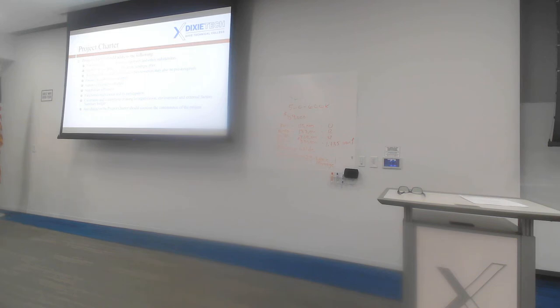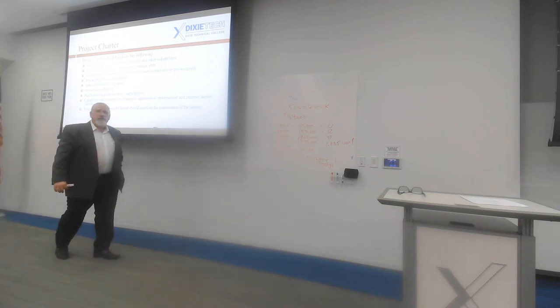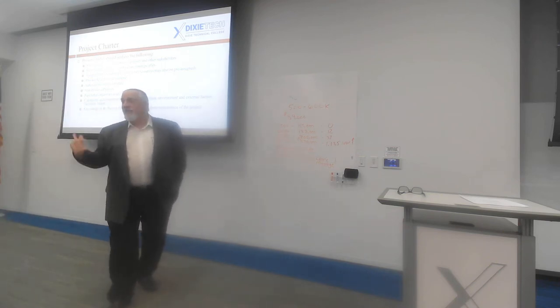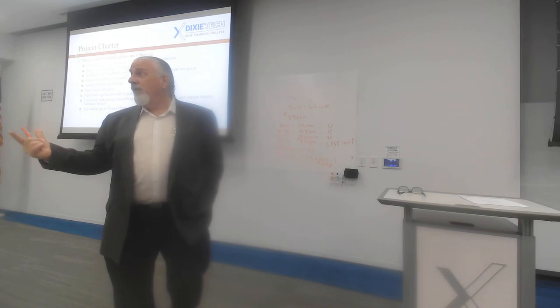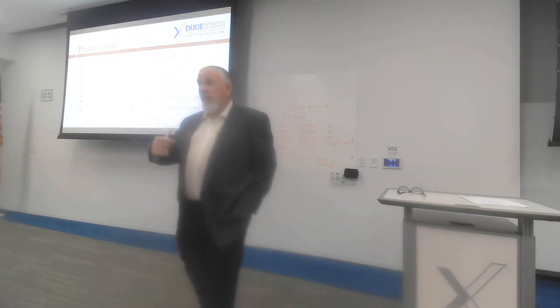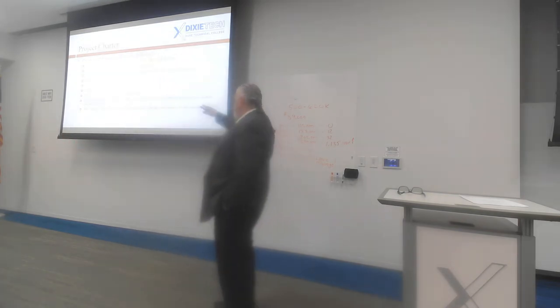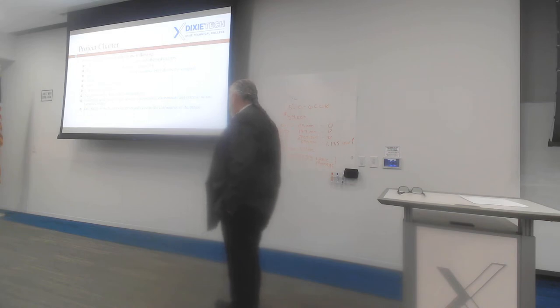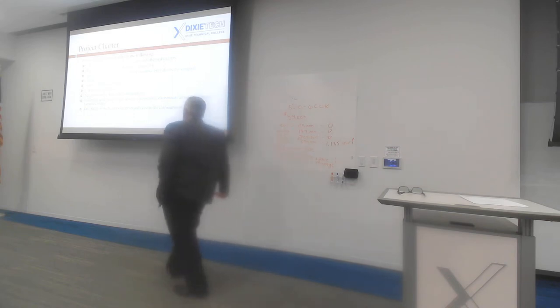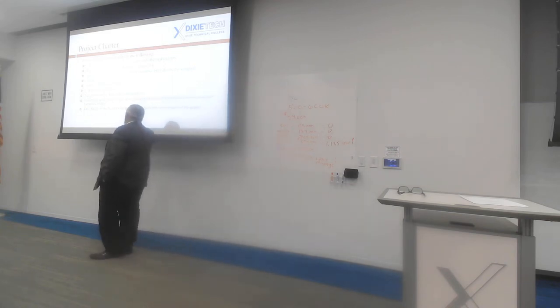What the functional organization is that's around the project. So this is how it can get derailed a lot of times. So we name it and describe it. What the constraints and assumptions are that we are seeing, and the external factors, like the county commission has to sign off on this water park before we can actually build it, even though we've got all the rest of the ducks in a row. That's normally put in the charter. And what impact changes have on the project itself.